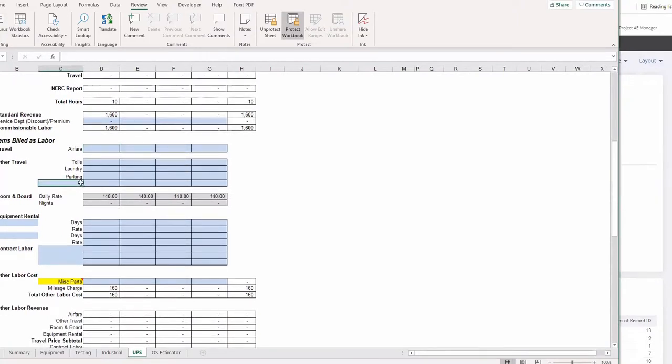You have a blank here I didn't go over a while ago, a blank for shipment of tools, whatever it is that you need to add in there. Shipment of tools, $300. I'll ship anything there and back, I would think. So you don't go sit there and try to go to Google and find out how much it costs to ship something. $300 to get anything there and back.